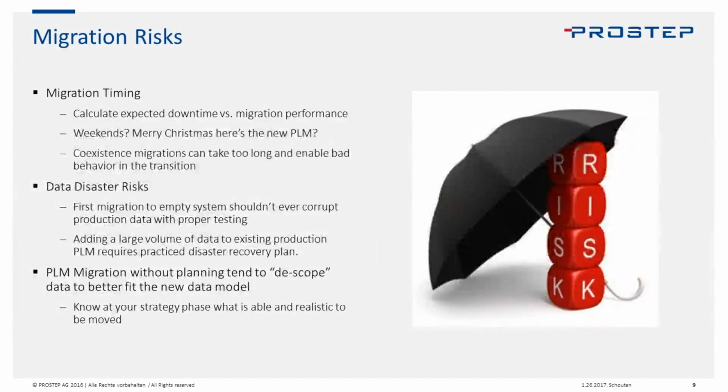Some risks that we can try and tackle and plan against, but you should know about. Migration timing, so performance and calculated downtime, and this is something that we can provide different strategies for tackling. Sometimes if you're using a one-time migration, it might be we're going to run it over a weekend, or we've got a long break at Christmas, so we're going to load that data. Or we're going to maybe stage it so there's a more incremental type of migration, or possibly even have a long-term synchronization, what we call coexistence, in order to migrate that data in over time.